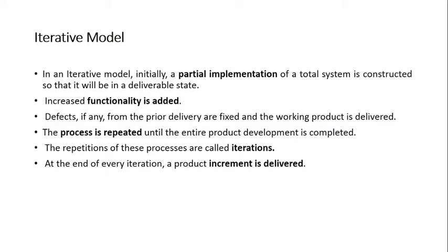When I have more budget, once revenue is generated after using these 3 modules, like if you go for counseling, definitely admission will take place, so you'll have money. You can then ask the customer to develop more modules, since the revenue is being generated, and you can use that money to develop the further modules. So this suits the customer, it suits the timeline, and it suits the cost constraints of the customer. This is the best suited model, and we will see further that the iterative and incremental approach is the best policy when you're going to develop software.